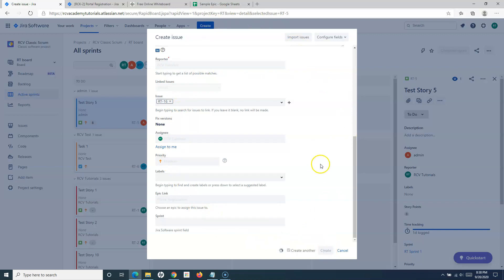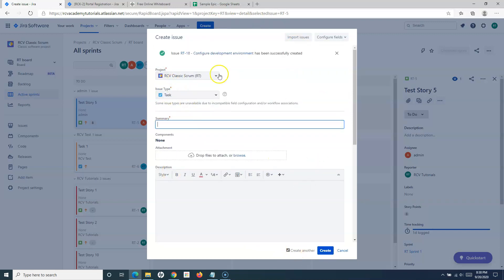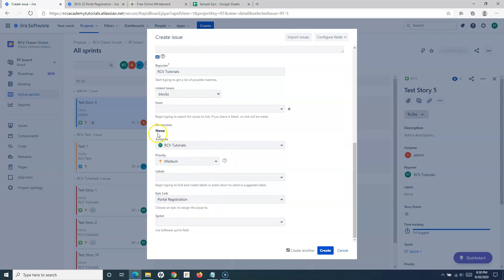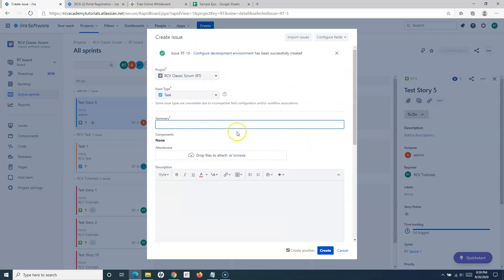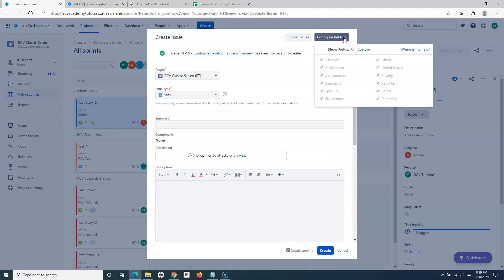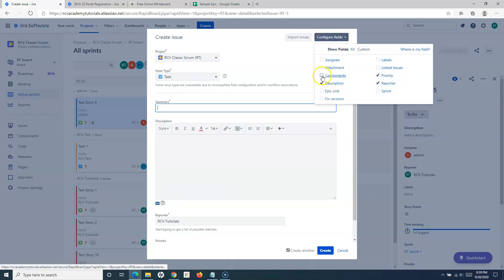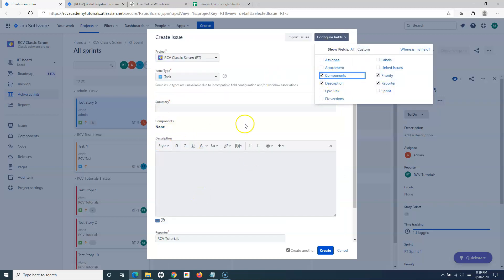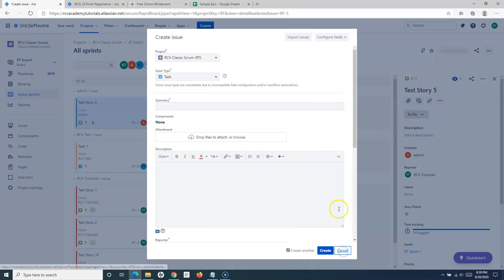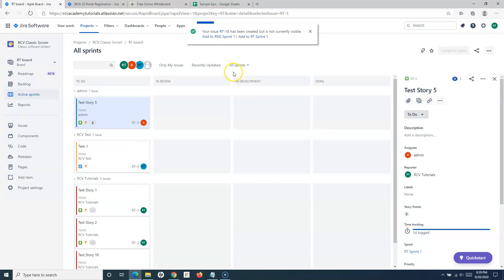If you want to create another task, check the 'Create another' box and the window will stay open. When you check that box, important information like assignee and epic link is persisted. You also have the option to configure which fields are visible — you can hide fields you don't want to see on this Create Issue form. That is one way to add a task to your project.